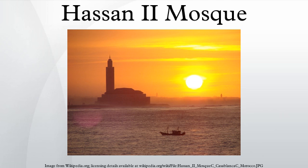It was designed by the French architect Michel Pinseau, who had lived in Morocco, and was constructed by the civil engineering group Bouygues. Work commenced on July 12, 1986, and was conducted over a 7-year period. Construction was scheduled to be completed in 1989, ready for Hassan II's 60th birthday. During the most intense period of construction, 1,400 men worked during the day and another 1,100 during the night. 10,000 artists and craftsmen participated in building and beautifying the mosque.